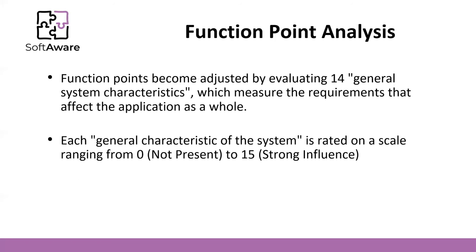Function points must then be adjusted by complexity. To do so we evaluate fourteen general system characteristics which measure the requirements that affect the application as a whole. Each general characteristic is rated on a scale ranging from 0, not present, to 15, strong influence.